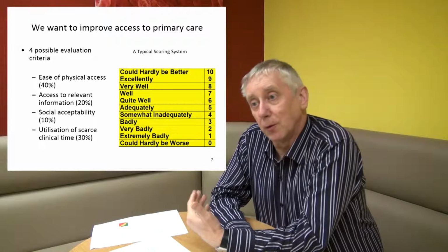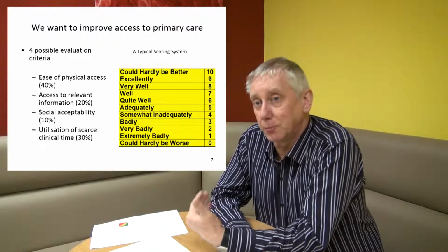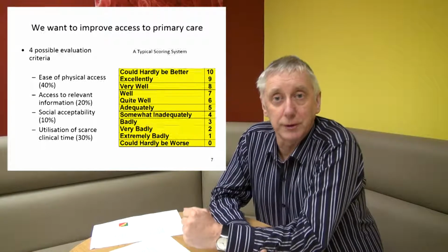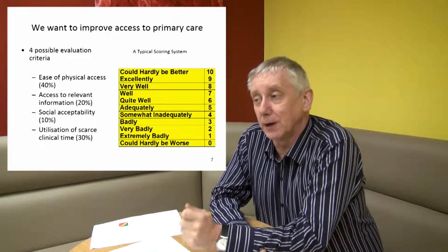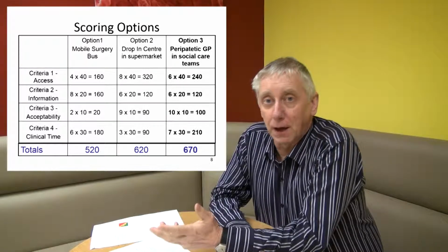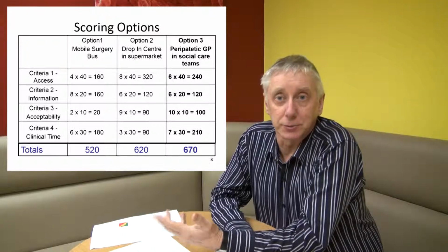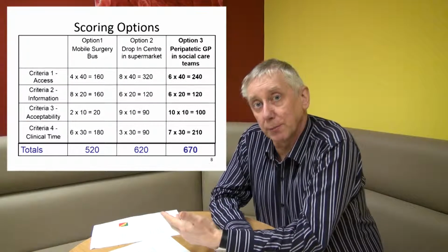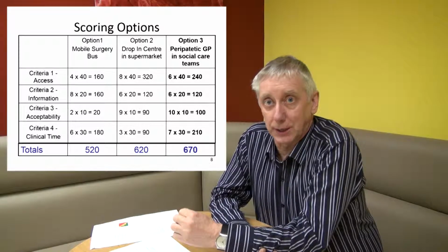So you decide which criteria are the most important and you provide them with a greater weighting or a greater percentage. You then develop the options and you score the options up. And on screen you will see a made up, quite spurious option appraisal process where you can see the scoring mechanism, the weighting mechanism, and you can see which option comes out the best.